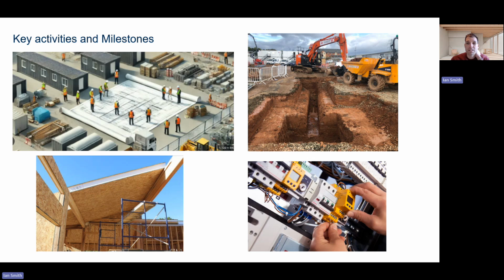The second major reportable activity is the completion of the groundworks and foundations. As we've mentioned, this stage is significant because it allows the construction of the superstructure to begin. Delays during this stage would affect the entire construction program.